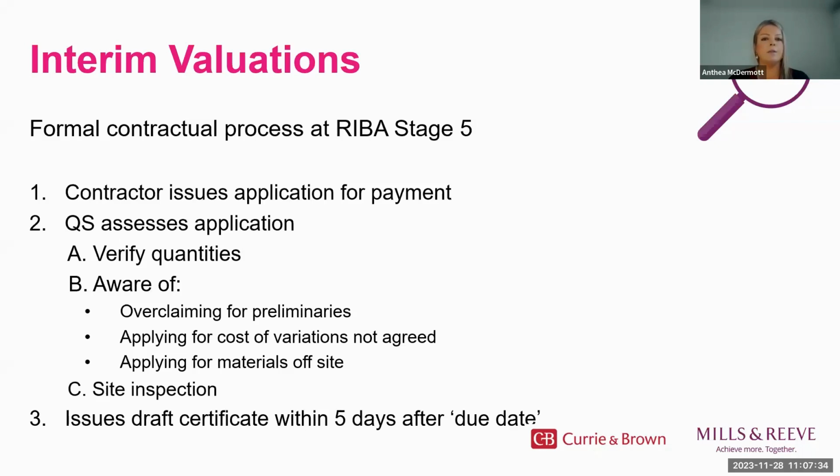It's important to note that it is not my role to assess whether the works have been carried out in accordance with the design, because that, of course, is the role of the contract administrator, or the NEC's supervisor. My role is purely to verify the quantum of works complete. Once I've made my assessment, I will draft a valuation certificate and issue it to the project manager or the contract administrator, who will then in turn issue their own payment recommendation certificate to the client.